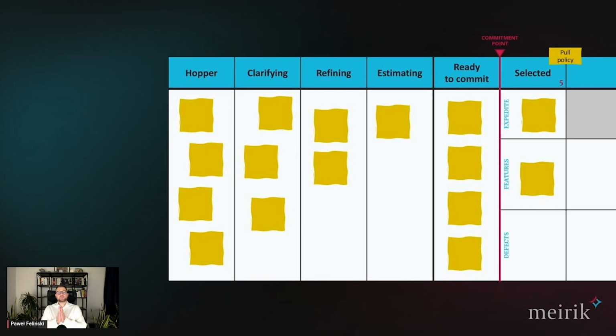Just an example, I can imagine an upstream Kanban that has 2-3 columns, maybe a dozen columns, depending on the situation. Of course, upstream Kanban is still Kanban, so it's not just a board visualizing what we are doing step by step, but also extra add-ons. For instance, we could or should even have policies for the columns. We would have a limit of work in progress. Interestingly, very often we have a minimum and maximum limit in here. In delivery Kanban, if you recall, we have a maximum limit of cards in a given column. This is important for statistics, for maths, also the theory of constraints.